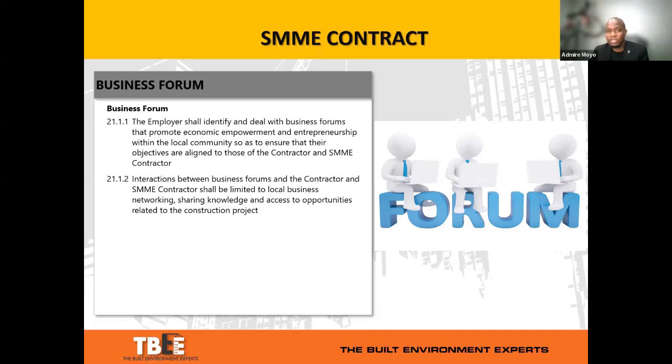It's not fully disclosed in the tender documentation, which often, if certain information is disclosed about perhaps the presence of a particular business forum in a particular area, that could be influential in your decision as a contractor as to whether you want to submit a bid or not in that particular area, or it would allow you to either jack up your rates or allow for whatever contingency measures that one needs to allow for in their project, just to mitigate against those business forum interruptions that may occur.